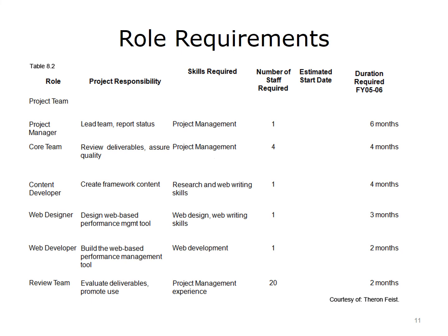Defining and documenting project roles in this fashion assists greatly in determining detailed staffing needs and is often used to pair needs with existing institutional resources or to determine if outside resources will be required. Also, it helps with the allocation of resources within an organization and informs the detailed version of the resource calendar.